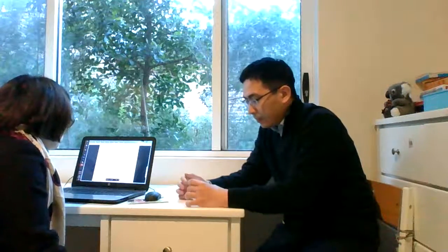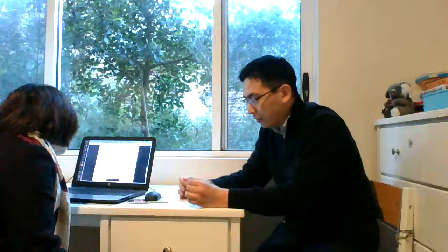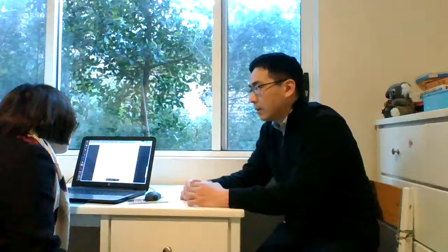Okay, and what improvement do you suggest in the future? Yeah, so after a thorough investigation, it is to our understanding that this issue clearly resulted from lack of communication between our engineering department and the installation department. So I suggest in the future that for all the scope documents that are prepared, which have interface with other functions, these documents must be reviewed by relevant departments and signed off. And I think we need to improve this scope control process in the future for the greater good of the company as well.